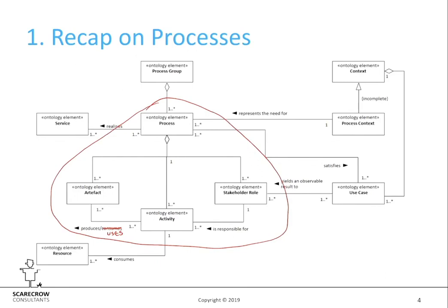And we also have the concept of stakeholder role. In this case, the role of a person that is responsible for. Now, responsible for is deliberately vague, and it covers a multitude of responsibilities. And again, last week we talked about essentially replacing that single relationship with maybe up to 5, something like RACIC. So you could have 5 different stakeholders linked to an activity.